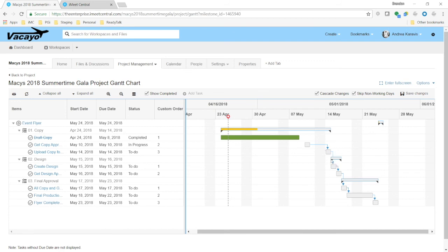See how you've got two task lists, and the first task in this list is dependent on this task in this list? That to me is a big no-no, because as you saw, if you change a task and you navigate away, even if you navigate to another task list to be like, whoops, did I mess something up? You've lost the chance to click that undo button and you're in trouble. So I limit my dependencies to be within the same task list.